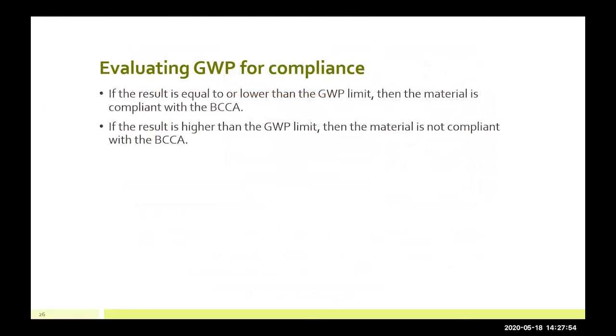So evaluating GWP for compliance. If the cradle to gate GWP value in your EPD that you're looking at is equal to or lower than the GWP limit, then the material is compliant with the Buy Clean California Act. If the result is higher than the GWP limit, then that material is not compliant with the Buy Clean California Act.